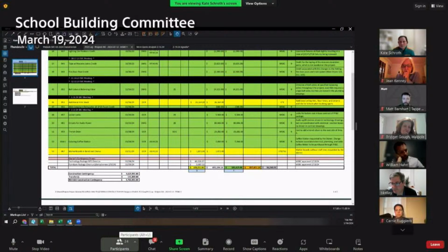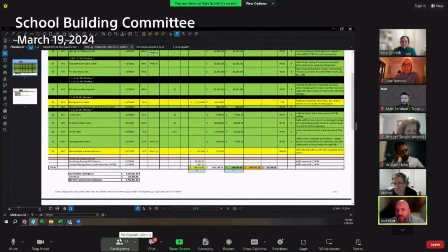Kate? Yeah, would I be able to jump in on that a little bit? Just like when the electrical bidders are reviewing the drawings and looking at what devices are shown on their electrical plans that they have to provide power for, they're going to pick up how many feet of wire they need to pull to that individual device, if it's shown on the drawings. They go through the same exercise now, and the change order, when it comes in, gets thoroughly vetted in our office, goes through the electrical engineer for TAP A.